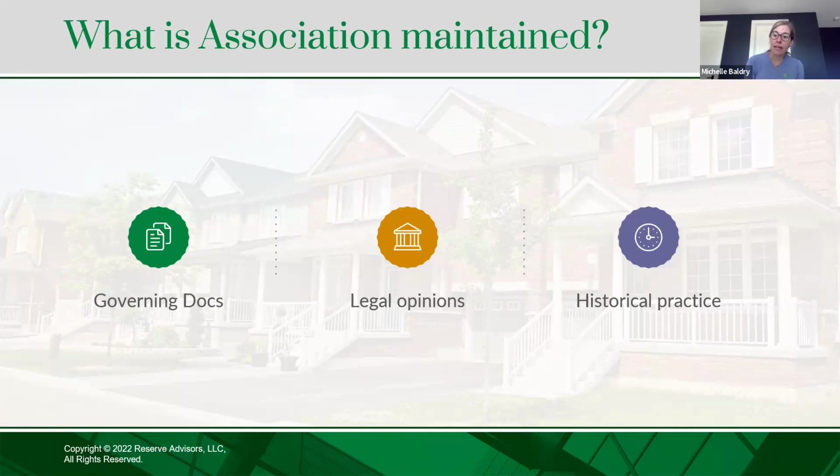But we will work with you to understand how you've interpreted those documents to make sure we understand what is commonly maintained. And then we'll also want to discuss historical practice. It might be a condominium where the facade is maintained by the association and the windows and doors are maintained by the homeowners. The sealants around the windows might be considered more part of the facade. So even though it's at the window, historically the association maintains that as part of the facade. Those are the sorts of things where we want to understand historical practice and how you've operated, and what we should include in that reserve study.